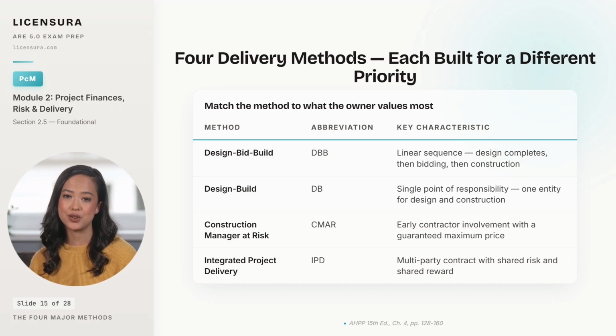Design build folds design and construction under a single contract. The owner hires one entity, the design builder, who takes responsibility for both. The architect on a design build project is typically a subcontractor to the design builder, which fundamentally changes the architect's relationship to the owner.